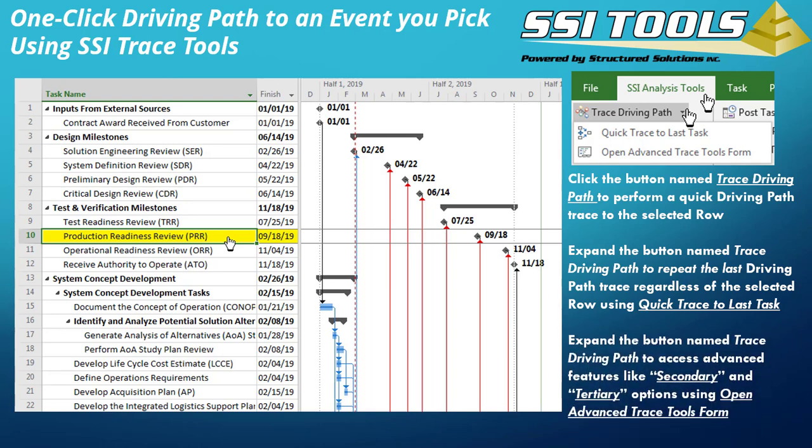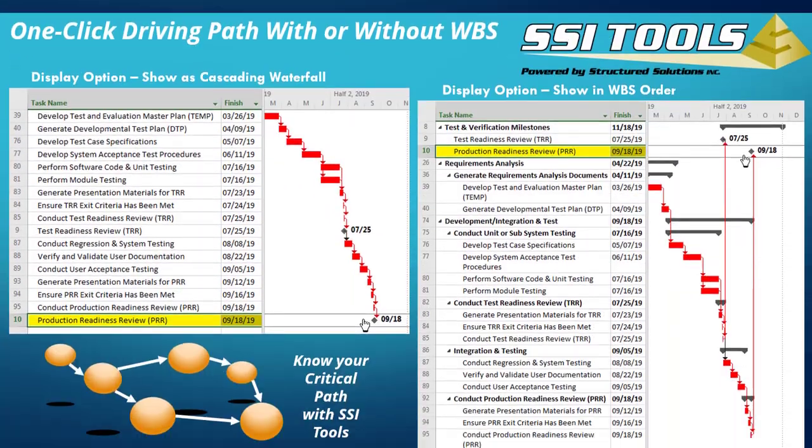For example, you can add near-critical or near-driving path tasks to get secondary and tertiary paths. If you have SSI Analysis Tools, you can pause the video now and give this a try using an example project or a project of your own.